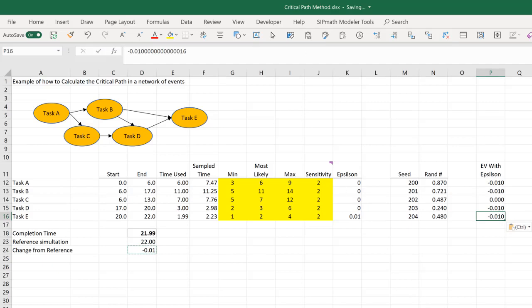So what have we learned? Using the most likely values all the time, A, B, D, and E are all on the critical path. And C, task C is not on the critical path.